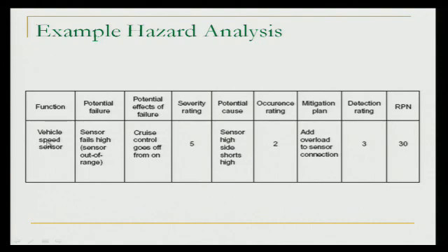And how do you do it? Well, the way it works in real life is you get some domain experts, the ones that really understand the system, the hardware, systems engineers. Sometimes you even need more specialized domain experts that understand certain components that can tell you how certain things might fail. The requirements engineer is not going to know all this themselves, so it's a team of people. And you'll go through multiple meetings to try to get this data.